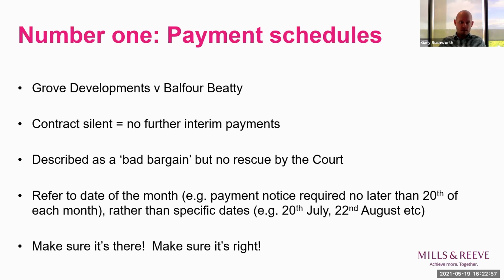As a firm, another thing we've done is include express wording that provides that if there is a delay to completion, then the contractor's entitlement to interim payments will continue, and the dates will be worked out in accordance with the contract terms, and they'll essentially follow on from those that are set out in any payment schedule included with the contracts. A couple of quick bonus tips in relation to payment schedules as well.